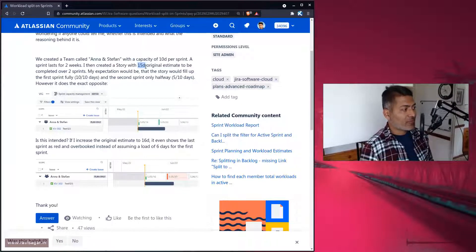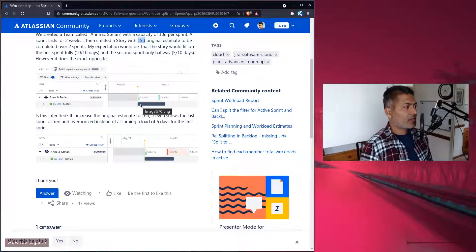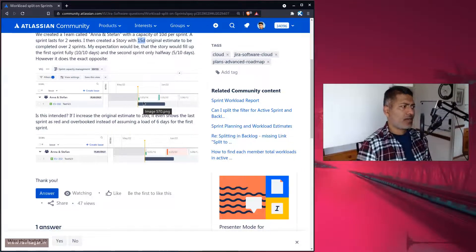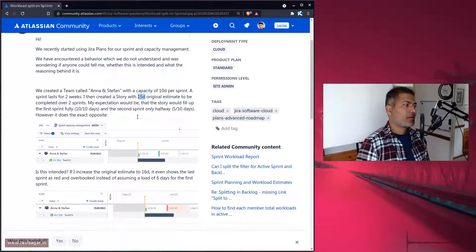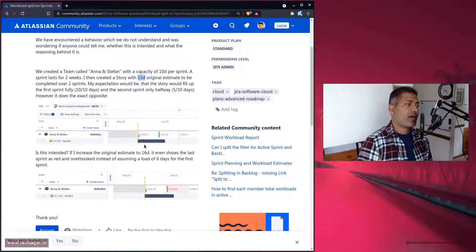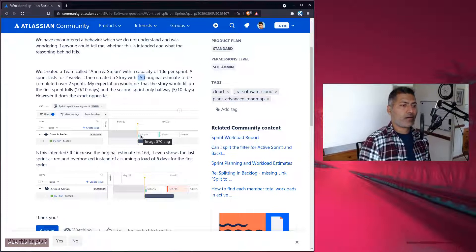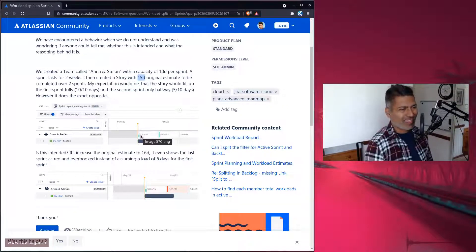So if the estimate is 15 days, what does advanced roadmap do? Advanced roadmap basically shows the story spanning across multiple sprints. What Stefan was expecting, I believe, is that the first sprint will be filled first with 10 days, and the second sprint will be filled with five days — something like that.